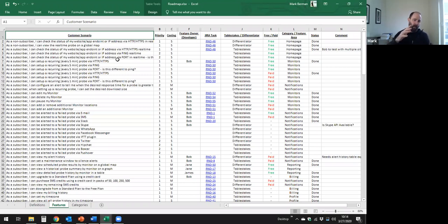And then once I've gone through this exercise and gotten feedback from a survey perspective, I take this and import it into a tool, say like Jira, and create my epics, stories, and then tasks for each of these things. And it's at that point where you have a pretty well-baked plan that you can start looping in developers to start working on. At least that's been my experience.